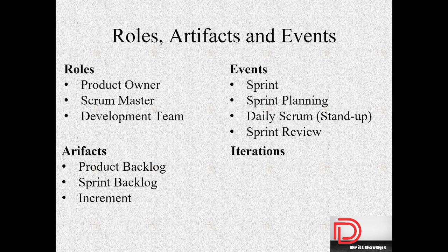A sprint is a time-boxed iteration, or you can call it an iterative fashion, or a time that has been given to the development team for working on certain pieces of requirements over a span of 1 to 4 weeks. Typically, max to max, it should go for 4 weeks, and each sprint should span a minimum of 1 week at least. This decision is collectively taken by the Scrum Master and the development teams.